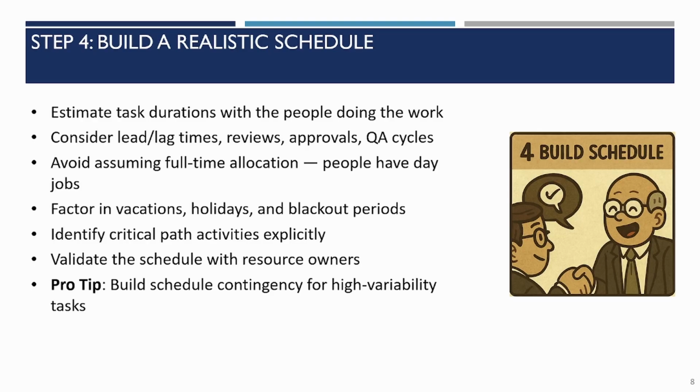We talked about the critical path. We've talked about validating a couple times. I am a big fan of schedule contingency. That is putting contingency in my schedule. So if my work tells me that I'm going to be done Thanksgiving, maybe I schedule it to the first or second week in December because I know there's going to be problems and things are going to slip. And I know you're going to say that a lot of times we're just given dates and we don't have the ability to do that. And I get that, but where possible, you want to add schedule contingency because I promise things are going to come up. And it's really hard to find time.